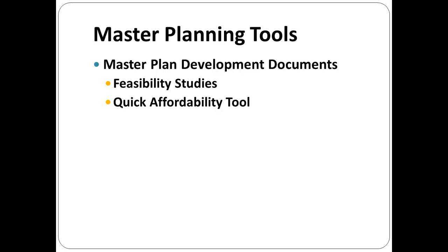Then we give you a quick cost overview tool that is a 6-part, 7-part budget broken down so that you can look and begin to give a guesstimate as to what, within a range, your building and site and design work and your furnishings, fixtures, and equipment and pre-construction cost, perhaps the purchase of new land or additional land, or your contingency funds you have to set aside.